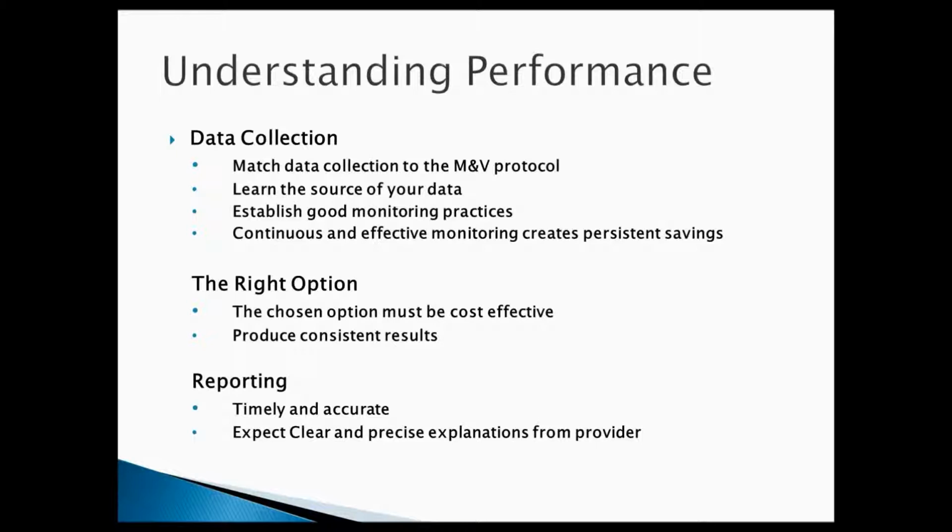We had an instance in one project where they weren't obtaining their savings, and we were watching the utility bill. We called the ESCO in, and what was happening was one of the pieces of equipment was not running efficiently. It was fixed real quick. It wasn't anyone's fault, but it was taken care of. If you're establishing good monitoring practices, you can catch things, and it really does help.